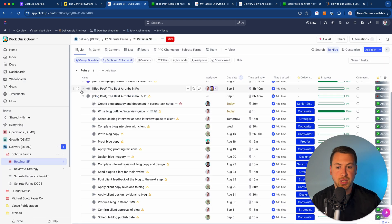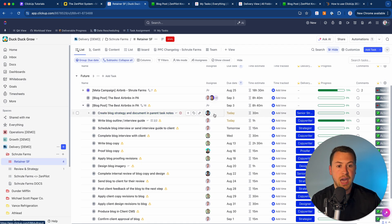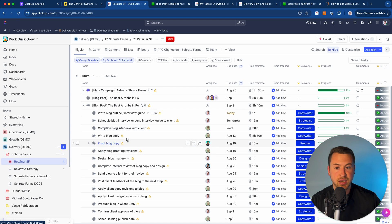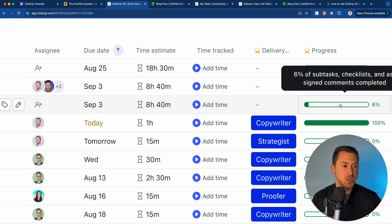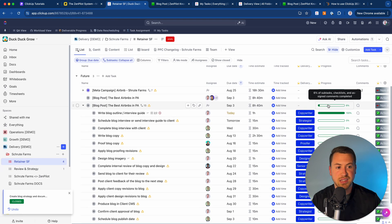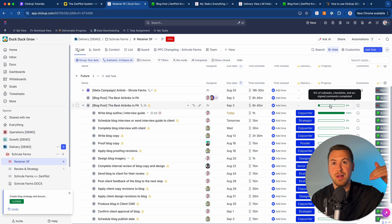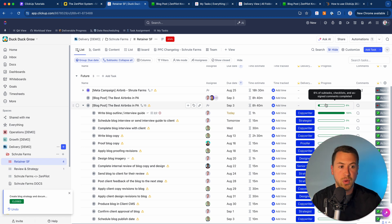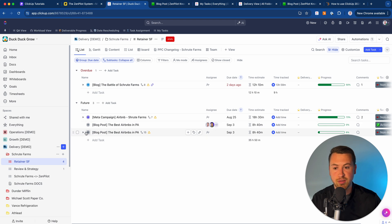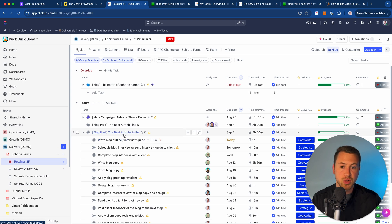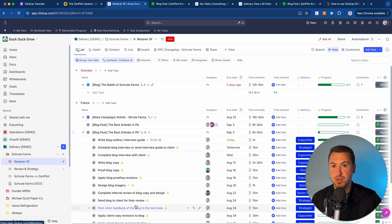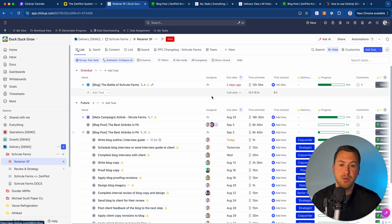In addition, as you can see, I can easily — as we go through this and say Gabriel finishes his task, he can close this out. What that's going to do is actually start to populate our progress bar right here, as you can see. So as we complete those subtasks, that'll give a good view at the high level, at that parent task level, how far along we actually are in this progress for the specific project or deliverable. I can drop that down and see exactly which step I'm on. And then if I actually get into the individual contributors of how they're going to see their work — because everyone always talks about how can I make my project management system easy for all of my individual contributors that are working, because sometimes it can be overwhelming.